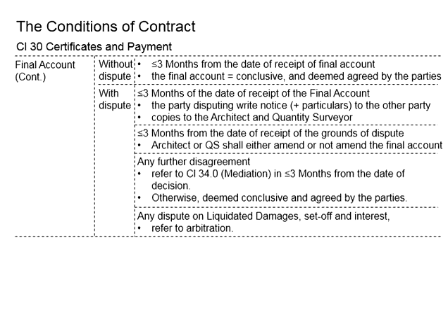If both parties cannot come to a common understanding, that means there is further disagreement in terms of the final account, this may trigger the mediations. That means there will be involvement of third parties, and this shall be brought to the mediations within 3 months of the decision of the final account. If both sides still do not agree with the latest version of the final account, and they do not bring it forward for the mediations, even though there is still disagreement, the final account is deemed conclusive and agreed by both parties. That means one party is not happy with the final account, but decided not to bring it forward to the mediations. We shall discuss these mediations in future.